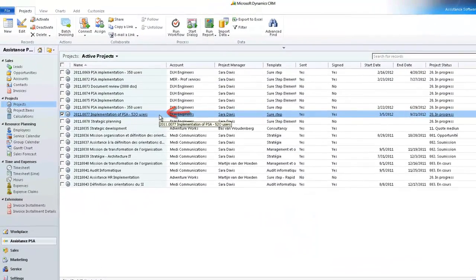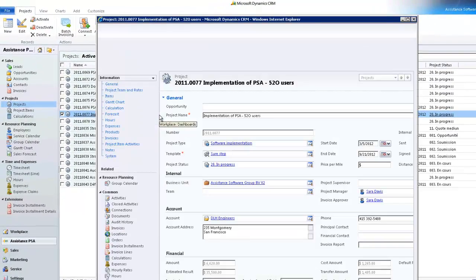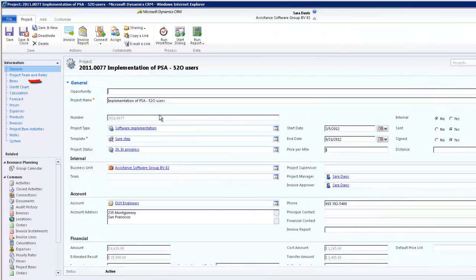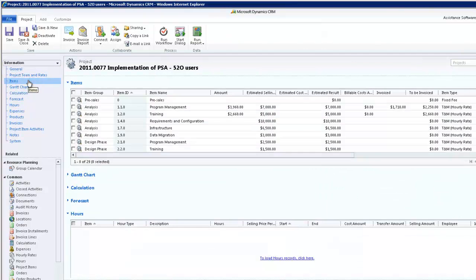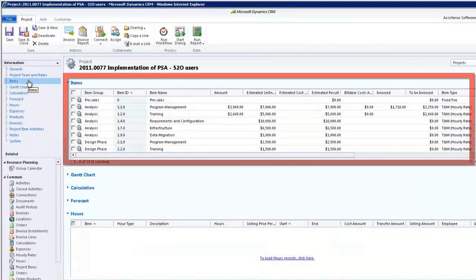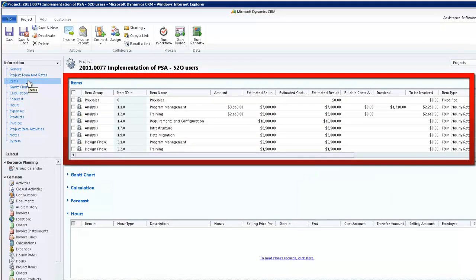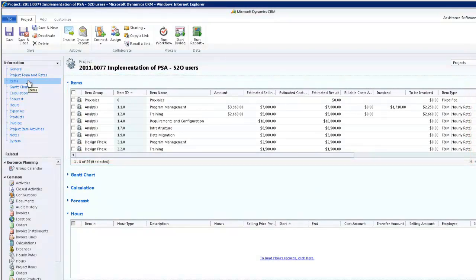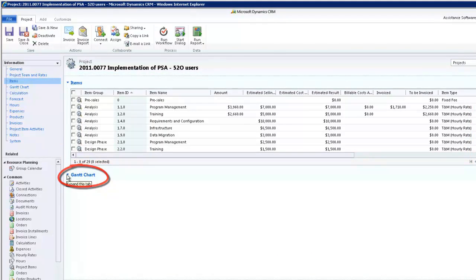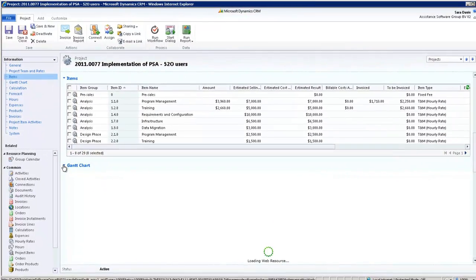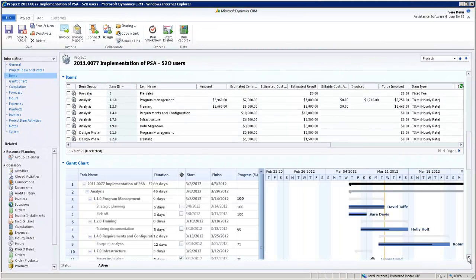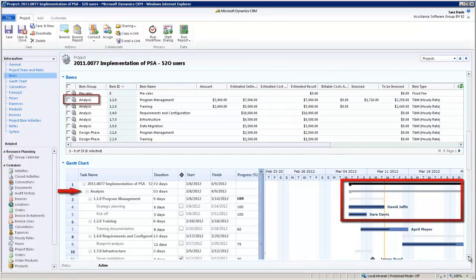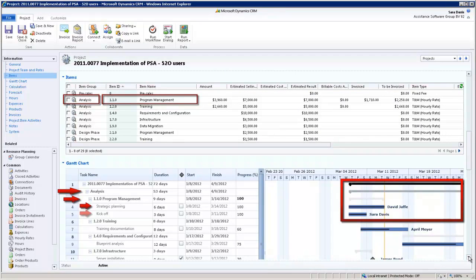Each project in Assistance PSA provides you with the possibility of extending your financial breakdown structure with project activities and milestones. One simple click on the Gantt chart section and your project structure is now fully displayed, each level clearly identified with at the lowest level your project activities and milestones.